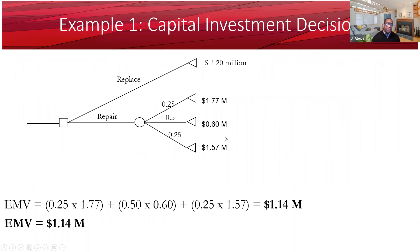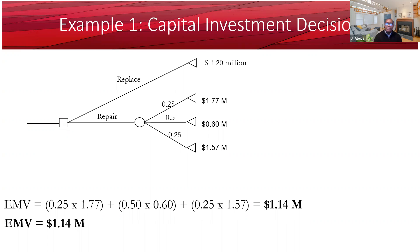Let's say you are contemplating replacing a piece of equipment in your factory. You have the choice between purchasing a new one or repairing it. The cost to replace it is going to be 1.2 million, but the cost of repairing it is uncertain. The repair firm told you there is a 25% chance it may cost 1.77 million, a 50% chance it may cost 0.6 million, and a 25% chance it may cost 1.57 million.